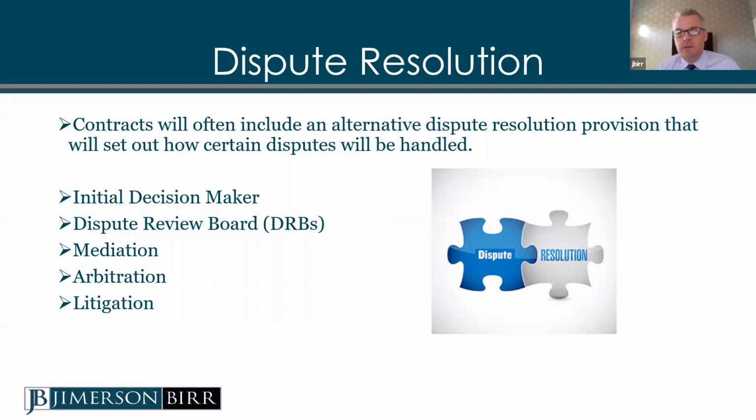Dispute resolution, that's where you go to get contract disputes resolved when they can't be resolved through the management channels or employee channels. Well-written contracts will have something that speaks to where the claims go to be resolved. There ought to be something in the contract that speaks to where the lawsuit or the arbitration will take place, whether there is a waiver of jury trial, and all those things, so parties aren't hiring lawyers to argue to judges that the case should have been brought here, but it was brought there. You want to have something in your contract that speaks to these issues and how they get resolved when they can't be resolved through the management channels.